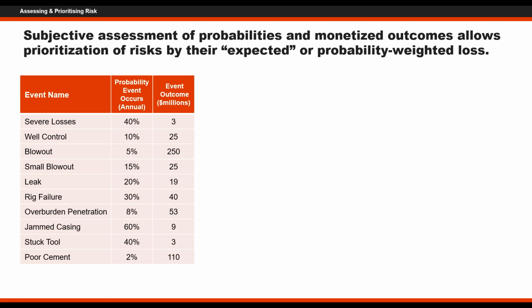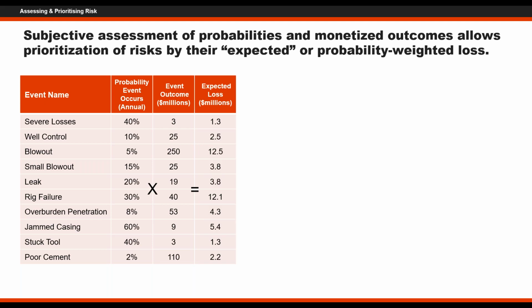So we would start with a risk register where a basic assessment, instead of ones to fives, we've just put a rough probability on there, and we've put maybe a single estimate of the potential expected loss, the average loss we might see from a particular outcome. And we can do a very simple calculation, and I think everybody is capable of doing. We multiply the one by the other, and we get an expected loss. And these expected loss numbers really give us a pretty good feel for the overall impact or the overall significance of that risk in your table.